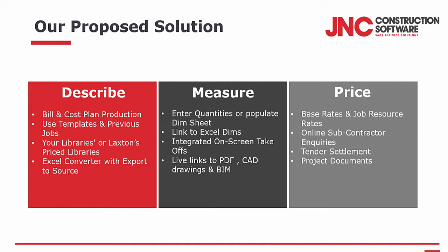Pricing is about amending the base rates at job resource rates. So maybe your labour rates in a different part of the country will be different. Adding your margins on via the tender settlement part of the system, and then maybe you also need to split your bill into subcontractor packages, which you can send out via our subcontractor portal and then compare and select one to use in your bill of quantities.